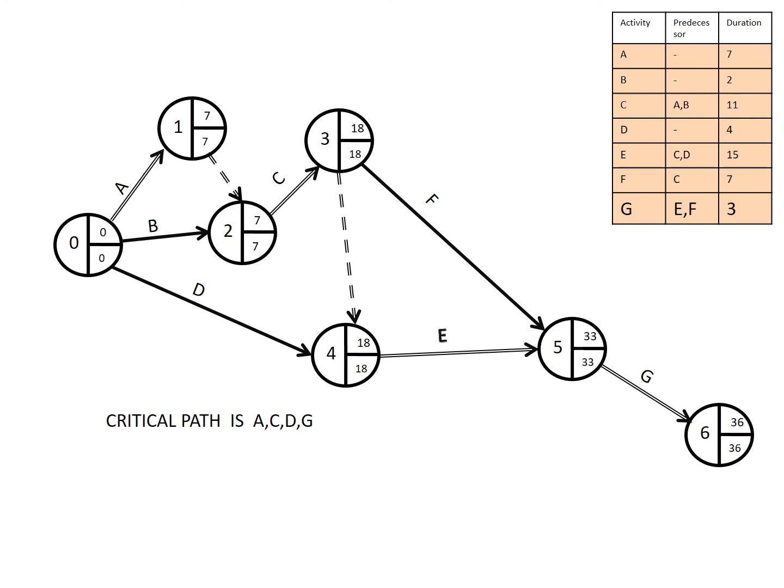Upon conclusion, you are required to identify the critical path by listing the activities that are on that particular critical path. So in this case, we are going to have activity A, C, E, and G. Now, somebody may ask, why are you not including the two dummies? If you remember, the definition of a dummy activity is that it does not consume time or resources. Therefore, if you have a critical activity passing through a dummy, that dummy will not be represented because it does not consume time or resources.